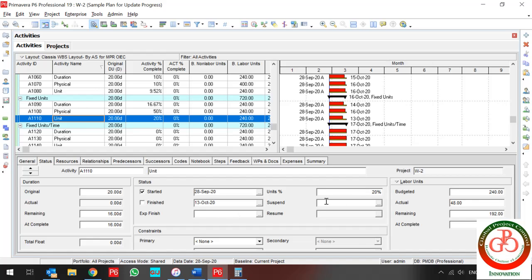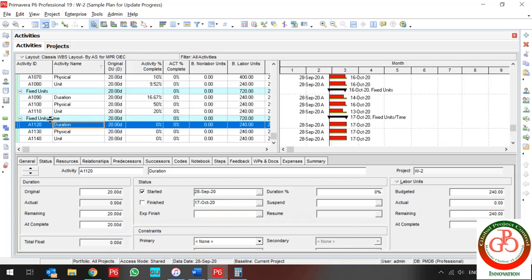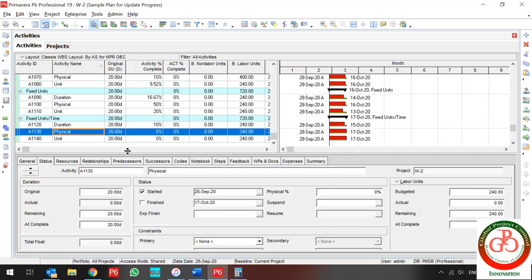What about Unit Per Time duration type? If my activity type uses Duration as percent complete type and I enter 10% progress, nothing changes for units but my remaining duration changes. So I update it by setting to zero first, then use actual in order to update my project by unit, because I should enter the work and can calculate the work unit.